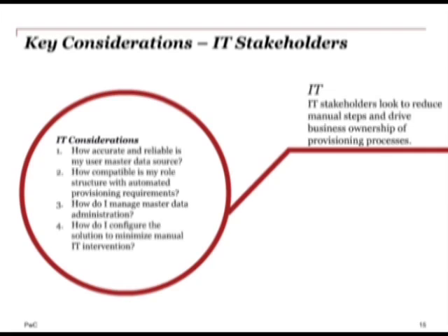And so certainly that's something that we want to address, and you want to make sure that you're considering when you're setting this up. Because one of the things that we found from that experience is that because they had data challenges, the user acceptance and the user satisfaction was lower than anticipated. And a lot of that was because when people were putting in requests, they were getting directed to the wrong person or potentially erroring out, which extended the time frame to get things done.